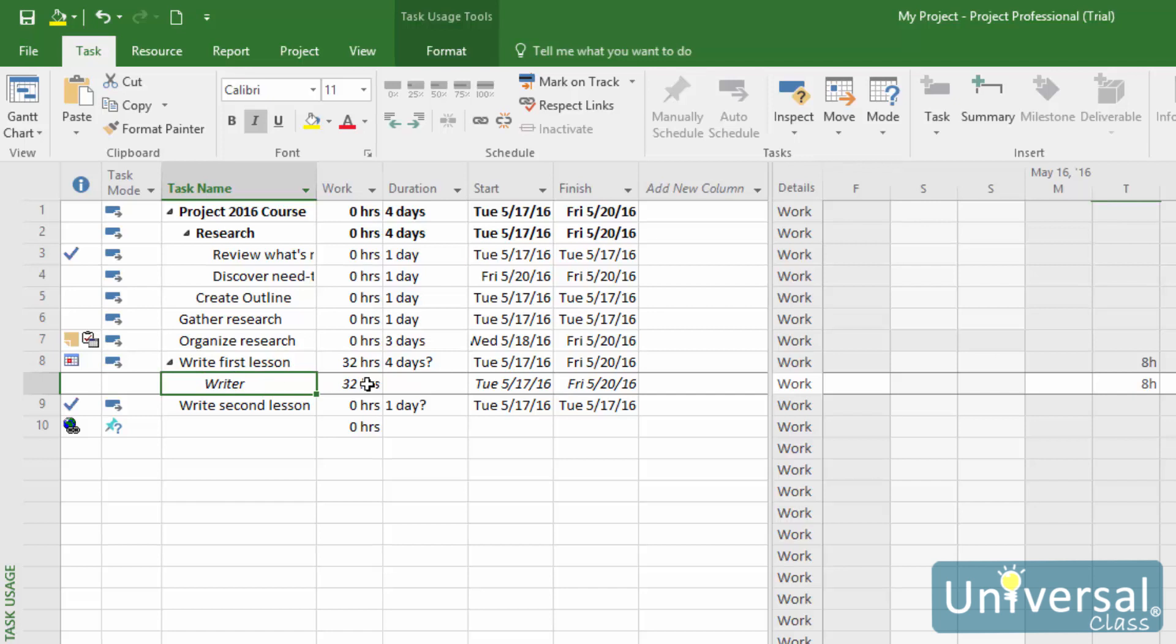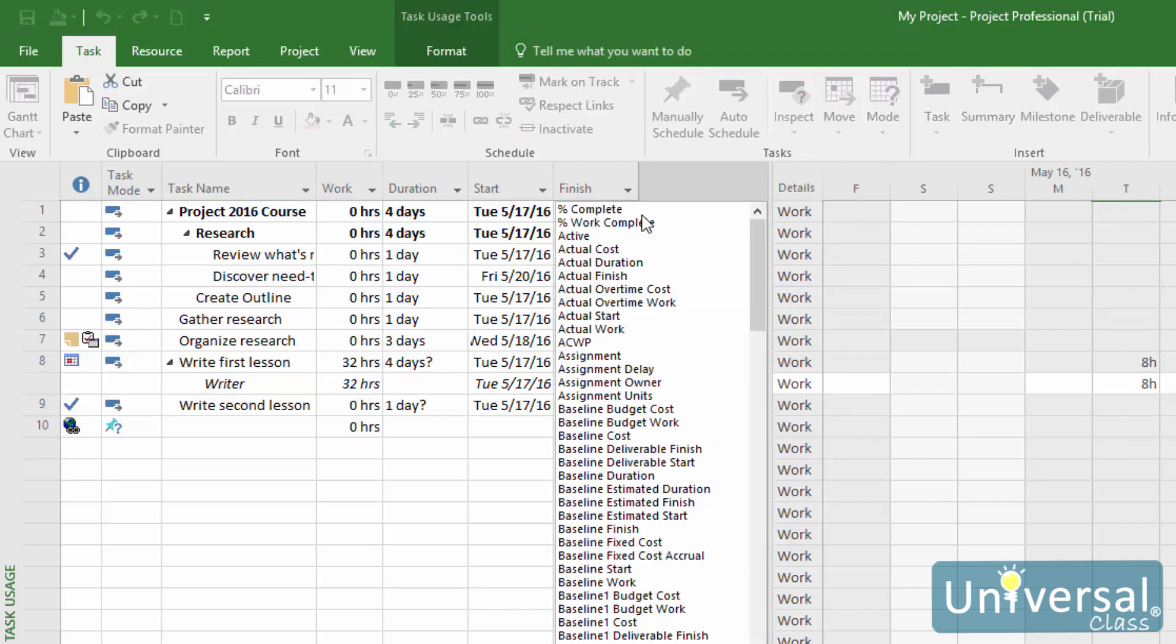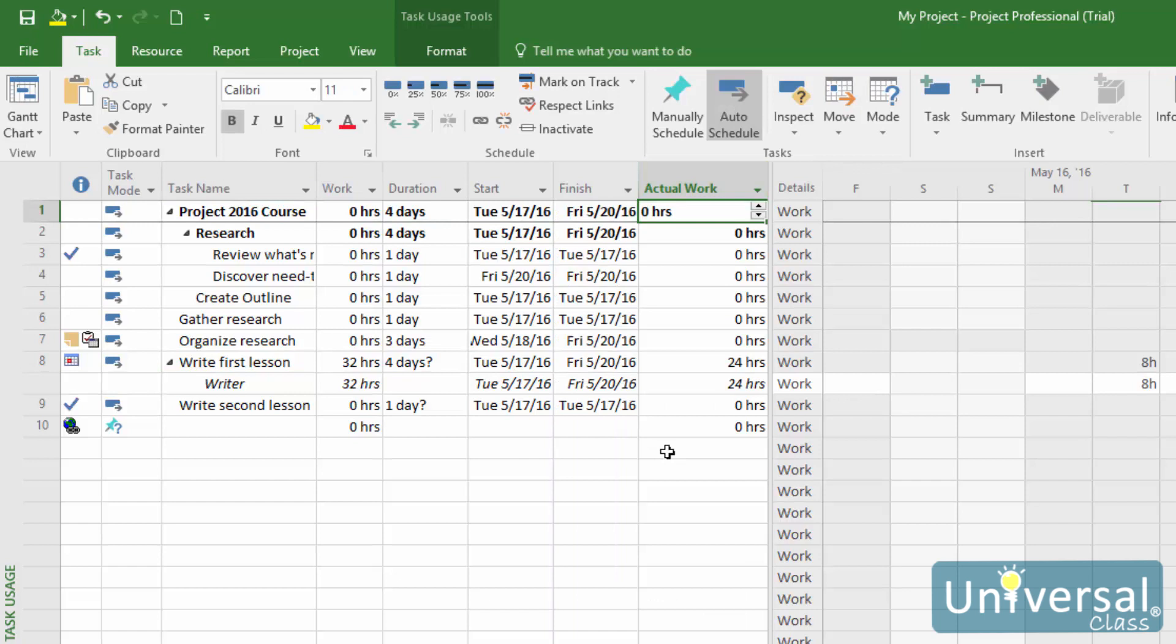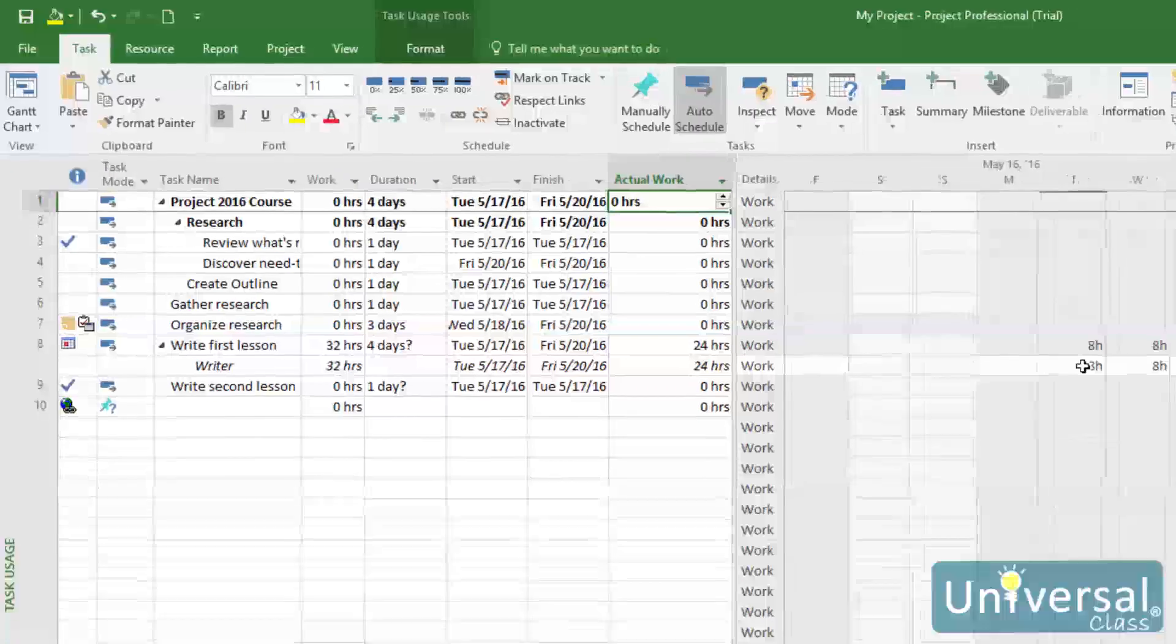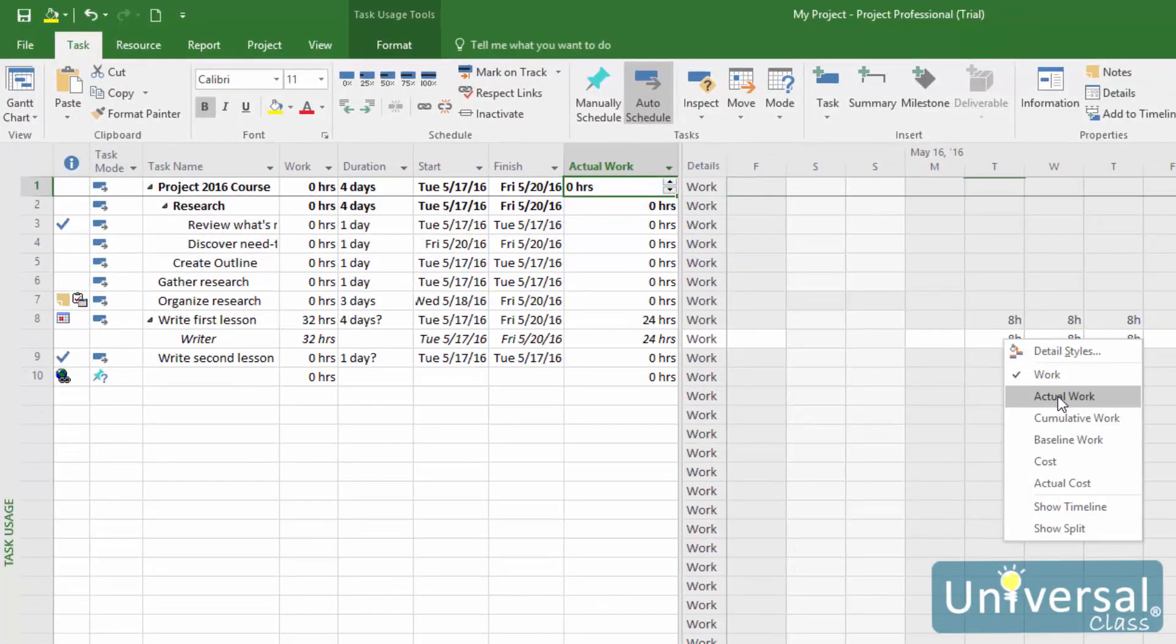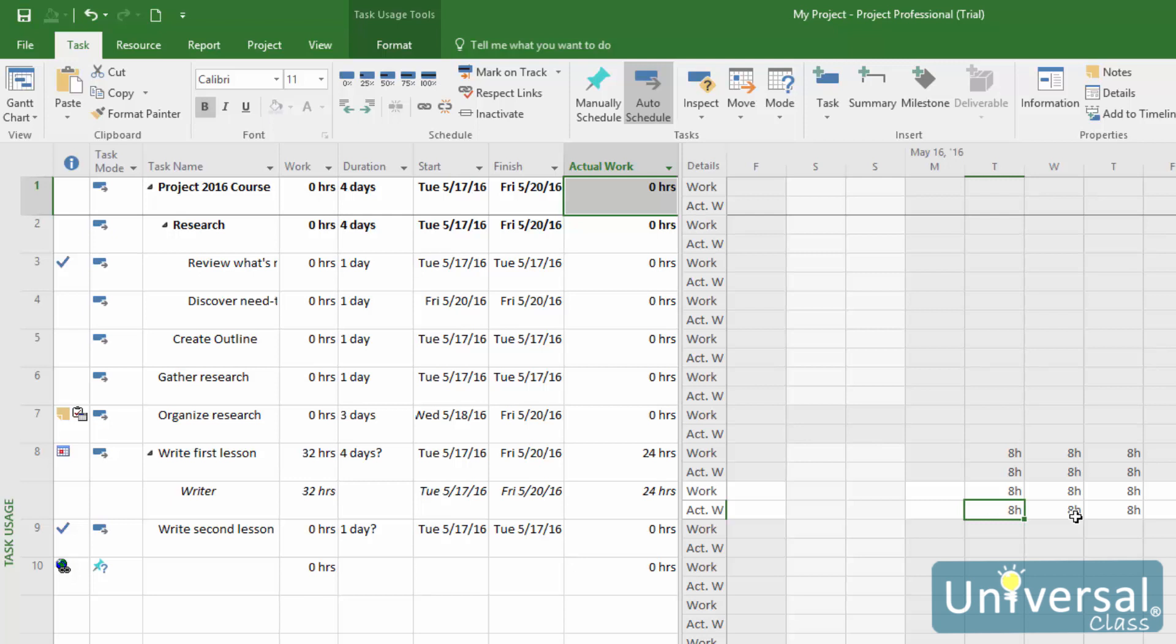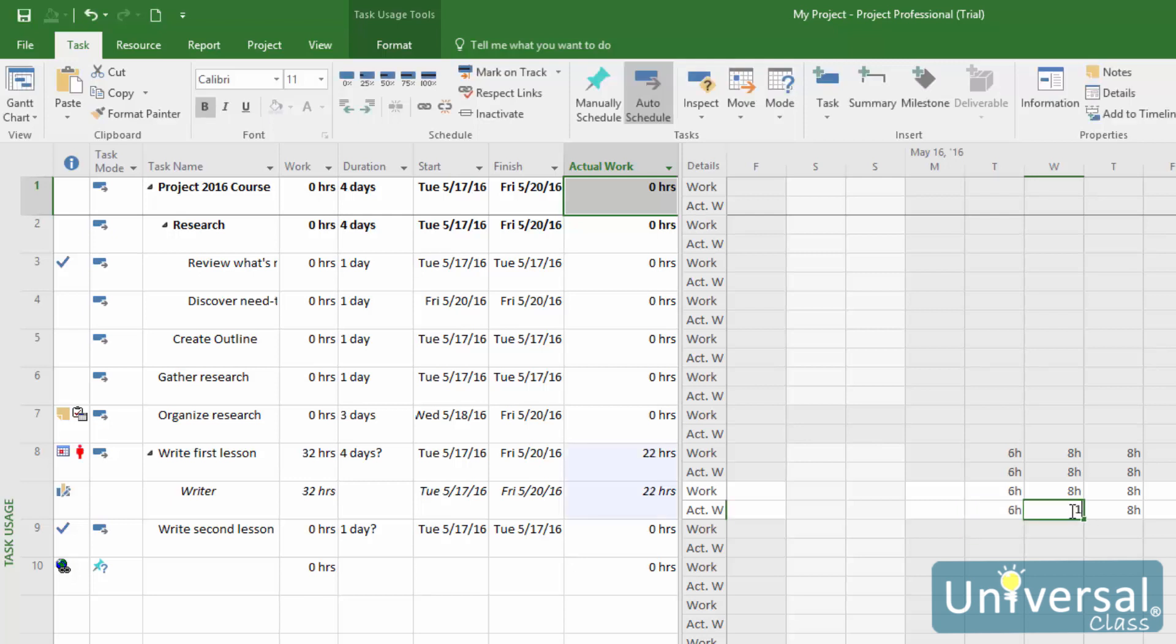Type in the number of hours that the resource was used. To enter total hours, insert the column named Actual Work into the spreadsheet. To enter the hours on the task for each day, right-click in the chart pane which is on the right side of the window, then choose Actual Work. The row labeled Act Work will appear. Click on the Act Work cell for the day the resource worked, then enter a number. Repeat that step for every day that the resource worked on that particular task.